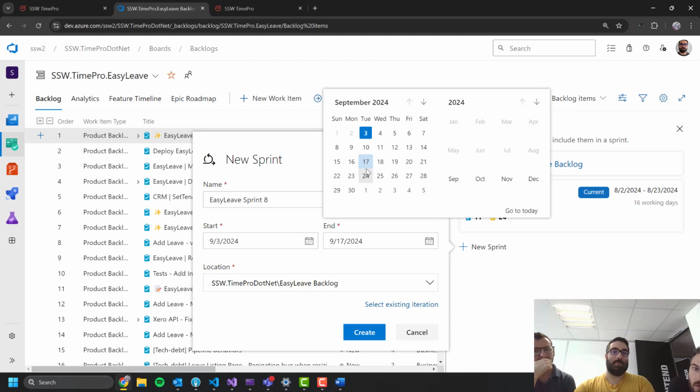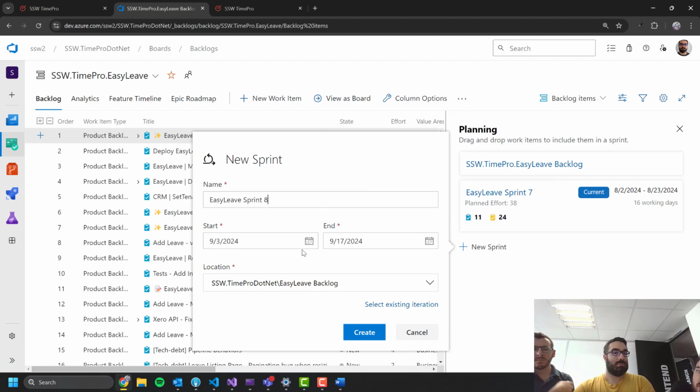Oh, okay. Sorry. On Tuesday or on Thursday? Tuesday. Oh, I thought you said all week. Oh, you're coming back on Tuesday. Okay, so the 17th. Yes, perfect. From the 9th to the 16th, so the 17th included. That means that Gilles is going to be working on his own on this project, though. So that's a risk. You just need to know when you plan. Yeah. Good.